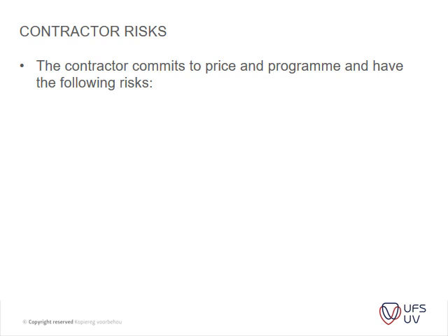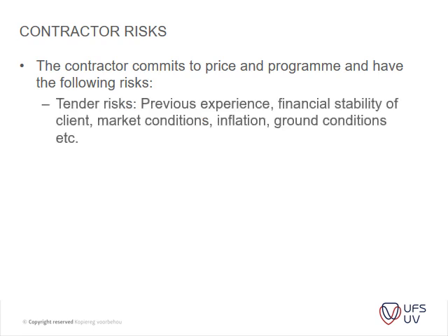Okay, looking at the contractor's risk, the contractor commits to the price and the program and has the following risks: the tender risk, previous experience, financial stability, client, market conditions, inflation, and ground conditions, etc. So whenever you conduct a tender, if you make a mistake in the tender, it's always a risk to the contractor, depending on the amount of information supplied to him. Okay, the quality risk, tested by both parties.